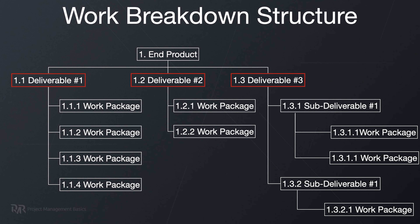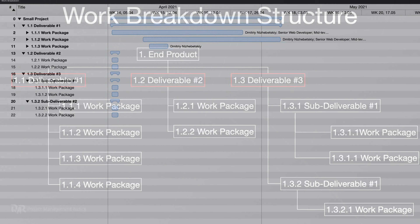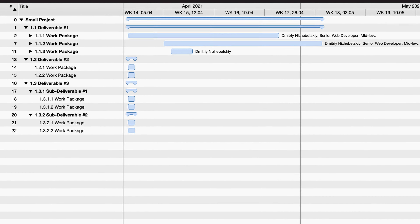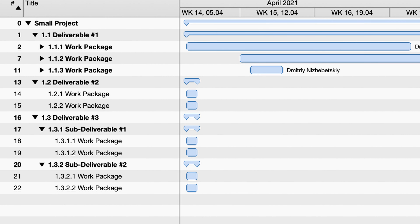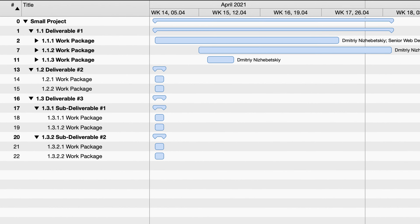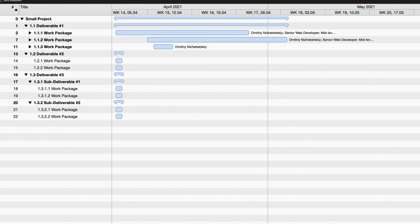A Gantt chart is a visualization of your tasks, durations, and estimates. So before you can draw a Gantt chart, you need to do all the prior work. Ideally, you start with the work breakdown structure — take your deliverables, work packages, and activities and transfer them into the Gantt chart. Most project management software does this in a seamless way.